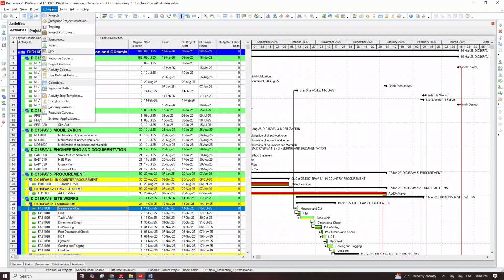Then the next one is your procurement team. Procurement teams are funny. What they normally do is to disconnect everybody so that you will not know the interaction between them and the vendor. But what you will do is advise them to put you in copy of the mail, because the vendor can reply to an email. One week on, the vendor is requesting for something and the procurement team has not even gotten back to the vendor.